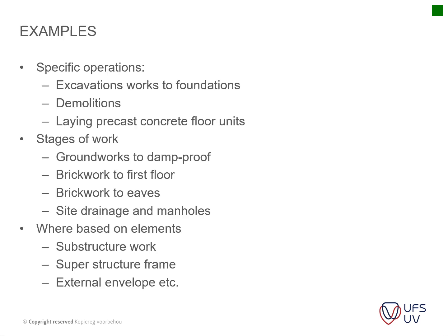Okay, then looking at specific examples, this is now on page 219. On the first page is specific operations, like, for instance, your excavation works to foundations, your demolitions, laying precast concrete floor units. Then you've got your stages of work. You've got your groundworks to damp-proof, brickwork to first floor, brickwork to eaves, site drainage, and manholes. So this is a bit more like a Gantt chart or your program type of